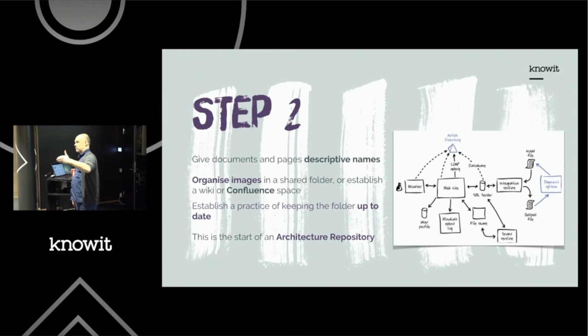Because as soon as you separate creating the functionality, creating unit tests and integration tests to test that it works, into different tasks, then a non-technical project manager can come in and say, oh no, we're really tight on time, skip the testing, just do the functionality, right? And they will say the same thing about documentation.